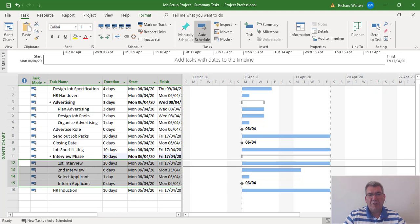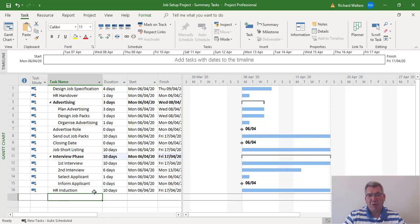Now what you'll notice is the durations at present are showing the longest durations of the tasks within the summary task. People might say that's not always going to be the case, and it won't be, because